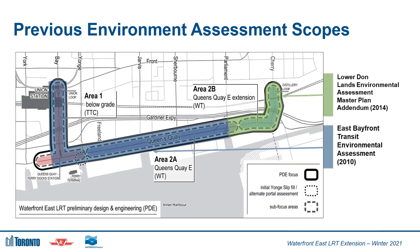There were two environmental assessments previously completed that covered the transit improvements in this corridor. In 2010, the East Bayfront Transit EA was completed, which covered improvements from Union Station to Parliament Street. And in 2014, the Lower Dawnlands Environmental Assessment Master Plan Addendum was completed, which covers improvements from Parliament Street to the Distillery Loop and into Villiers Island.